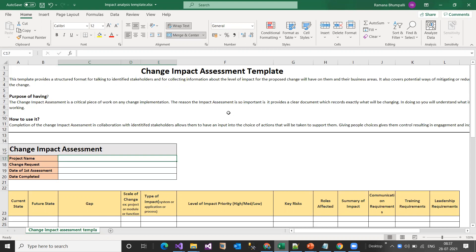The impact analysis template has major fields: project name — where you mention the project name — and the change request, meaning what change you are going to make. Then there is the date of first assessment, meaning when you started, and a date of completion, meaning when you completed that particular change request.